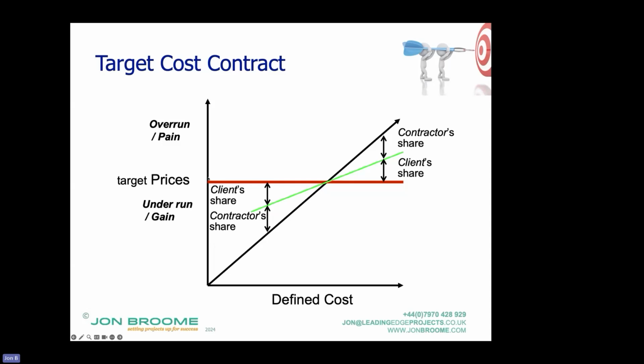So this then changes due to compensation events. Under option D, this is actually a running total because it might start here with lump sums, and then as the contractor does work, and the quantities start to be done, effectively you start going up this axis. So the QSs, God bless them, effectively have two jobs to do.